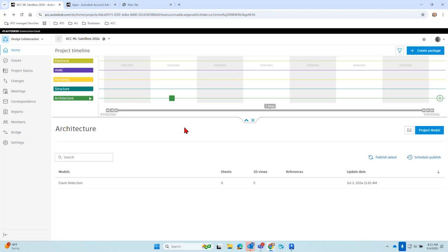There's a bunch of things to it, but the consumed method overarching is, hey, the team shared it now, which we just talked about with the shared method, but my team's not ready to get an update yet and fix the model to it, and I don't want them to do that yet. Then they can come in here and say consume that file when you are ready to have that happen. So yes, the structure team shared the file, but I don't want the architectural team yet to see the update. They have full control as the architectural team to receive that shared when they decide to.